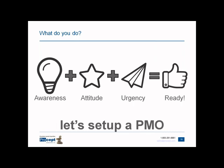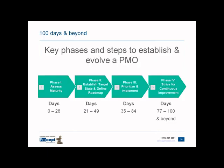With that framework and mindset in place, you are ready to set up a PMO. The key phases are: Phase one — assessing the maturity. Phase two — establishing target state and defining the roadmap. Phase three — prioritizing and implementing. Phase four — striving for continuous improvement. Underneath each phase, I've identified the number of days you should take for each. Know that this is a guide, not a recipe.